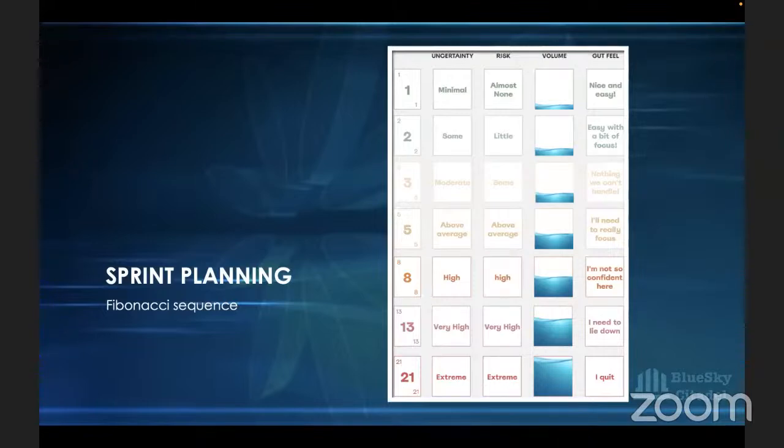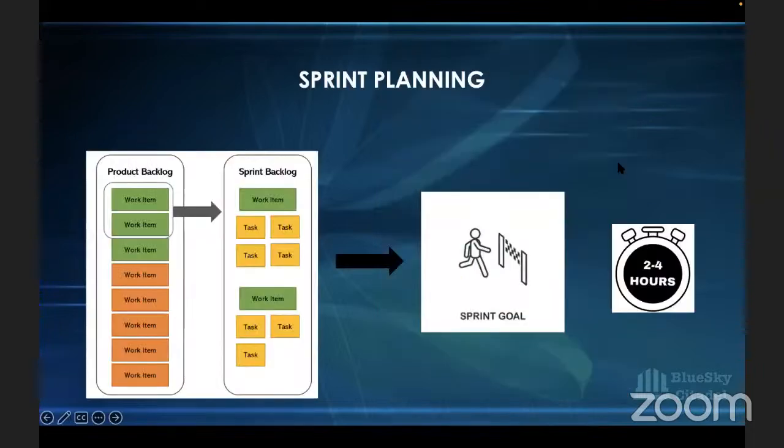After this, the product backlog items to be worked on in that sprint would then be moved to the sprint backlog. The sprint goal will be set, and the sprint goal is like the summary of work and value that will be delivered in the product increment. That means you ask a question like, so guys, after we've moved all these product backlog items to done, what do we hope to achieve? What are we going to achieve if we have moved all these things to done? So you just help them choose a sprint goal.